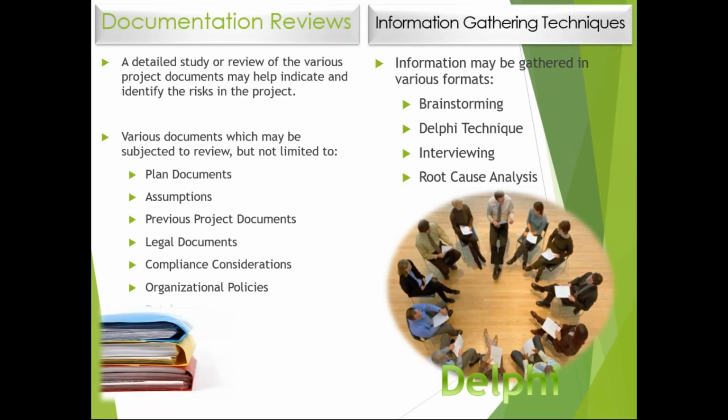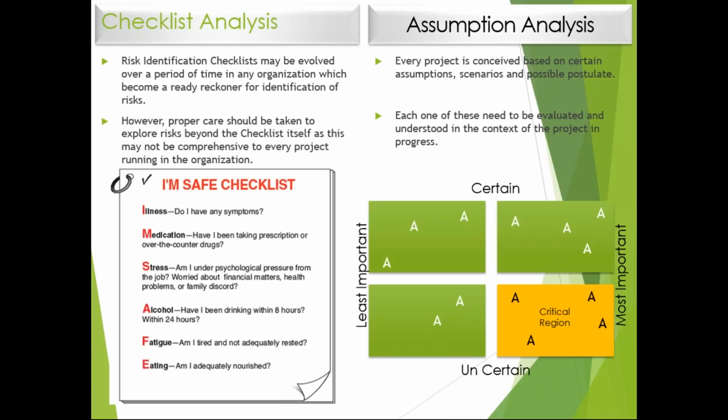Information gathering technique includes brainstorming, where you all get together and brainstorm. Delphi technique, I hope you remember what Delphi is. The keyword in Delphi is that you send out surveys, but the people respond anonymously. That is Delphi. Interviewing, one-on-one interviews, root cause analysis, all that is information gathering technique.